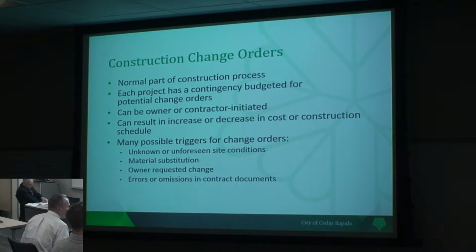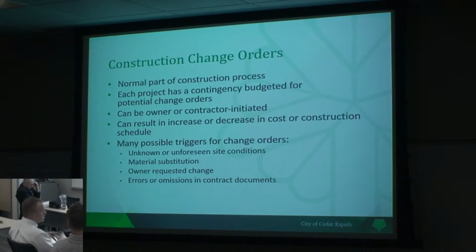Have you tracked the percentages in each of those categories? So that's a question that we actually got in development committee also. Right now we do not have the ability to do that in an organized fashion, but it's a project we've been working on with the finance department. We've been looking at assigning reason codes to the different change orders. And one change order may have multiple reasons. So you might have a change order that has a percentage that is an unforeseen site condition and a percentage that is an error and omission. So we've been looking at coming up with a way that is easily tracked and reported. We don't want to just willy-nilly be writing it down. So we hope to have that here over the next year so that we can report that, because that's valuable information to us.